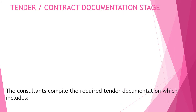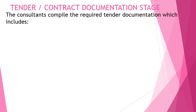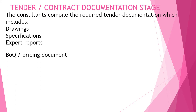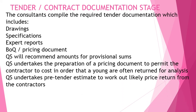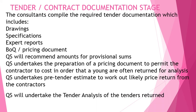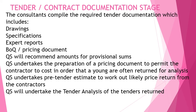In the tender and contract documentation stage, the QS compiles the required tender documentation which includes drawings, specifications, expert reports, BOQ and pricing documents, and recommends allowances for provisional sums. The QS undertakes the preparation of pricing documents to permit the contractor to cost, undertakes a pre-tender estimate to determine the likely price, undertakes tender analysis of the tenders returned, and prepares tender reports.